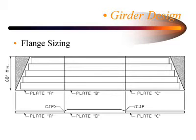Here's another example where that same thinking might help save some money. Here's that same funny looking bridge we had earlier. You can see that if we just used the thicker piece in the middle, we're able to use this slabbing method to put the flanges together. Now the flange or the girder on the top has the thicker material probably running a little more than it needs to, so you're wasting some material there, but it certainly is saved by the labor that was saved along the way.